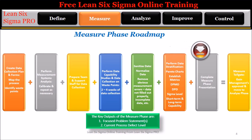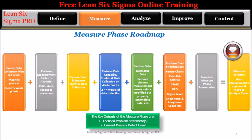Step 7: Complete the measure phase presentation. Step 8: Measure tollgate — gain management's approval and move to the analyze phase. The key outputs of the measure phase are: 1. Focused problem statements, and 2. Current process defect level.